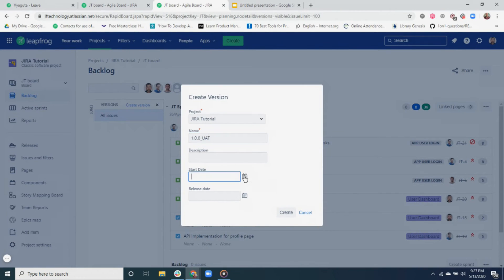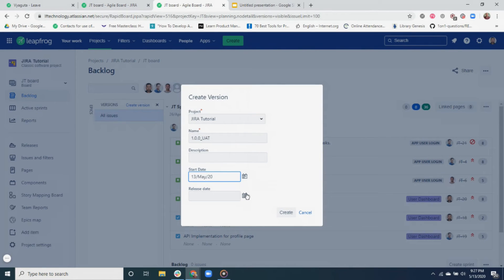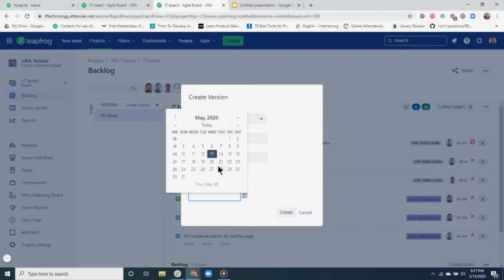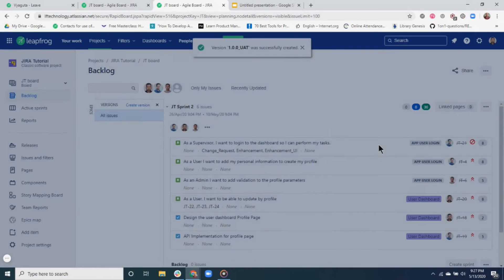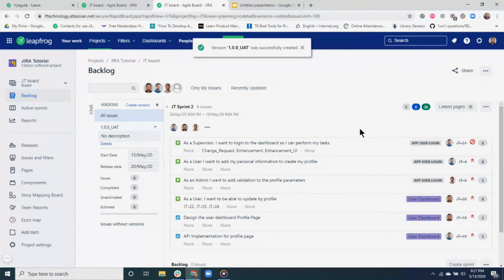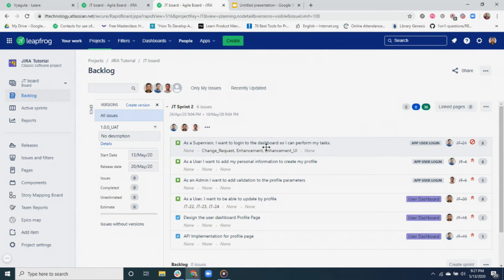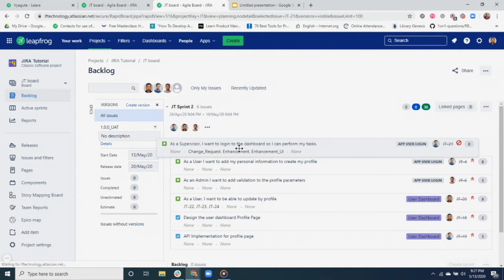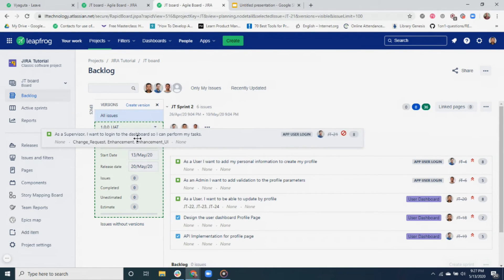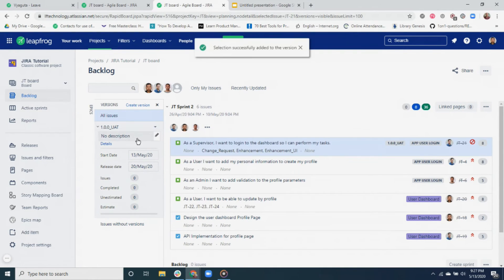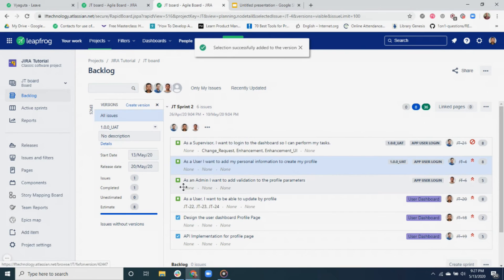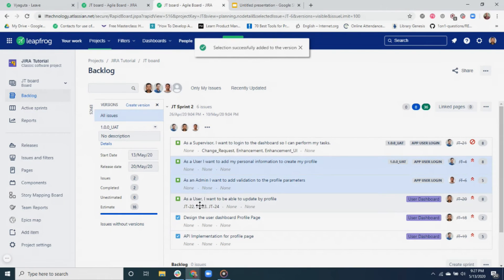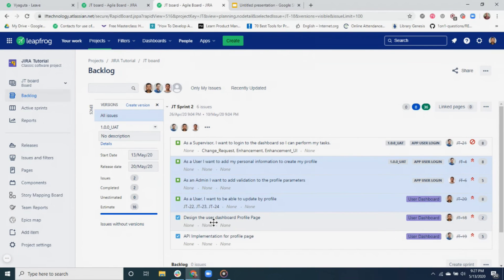The next step for us is to link the tags to the version we just created. In order to do that, simply drag and drop the tickets you would like the version to be added to. You can hold the Shift button and select and drag multiple tickets at once as well.